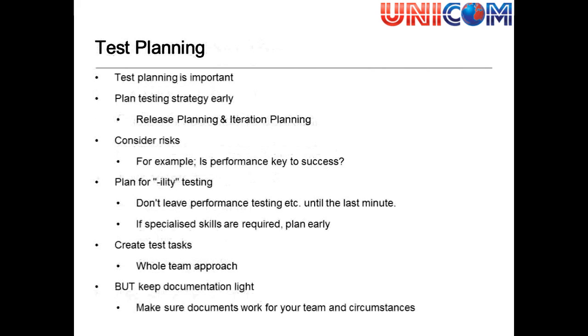So test planning, yes, it's still important. You're planning the testing strategy early. We still need to think about what it is we're setting out to test and how we will test it. So we'll need to consider the risks. So is performance important? When should we start performance testing? Should we start performance testing from day one? It's a risk assessment.